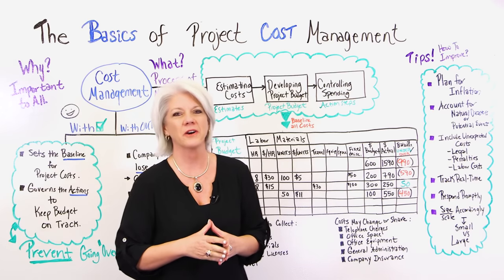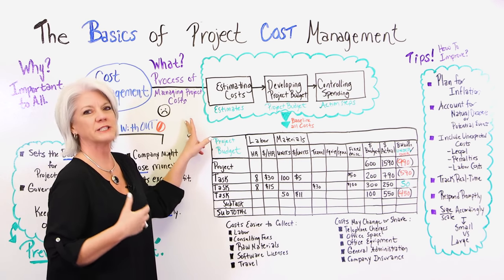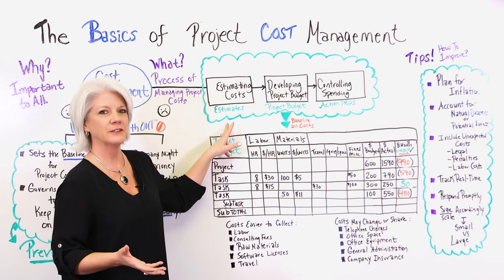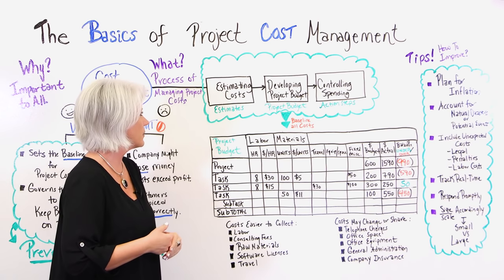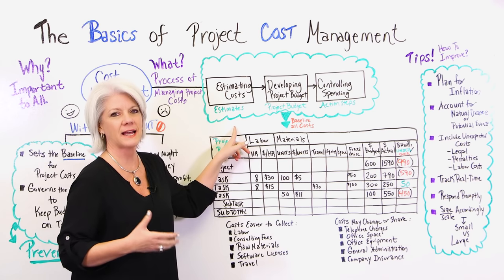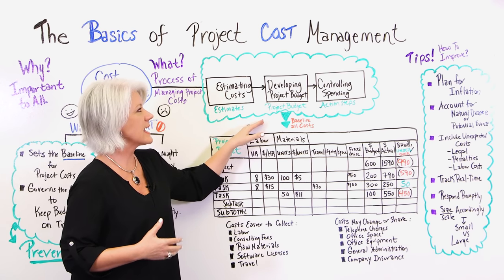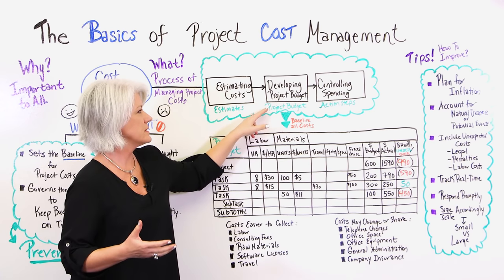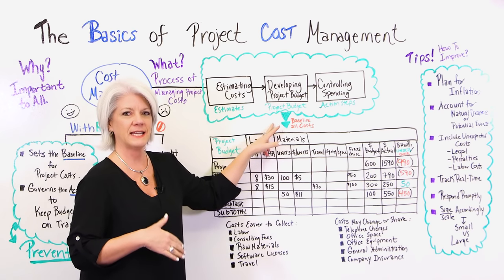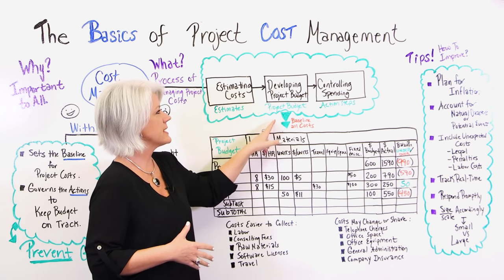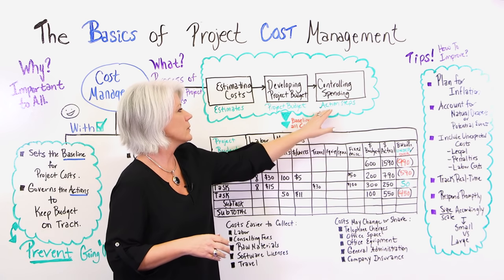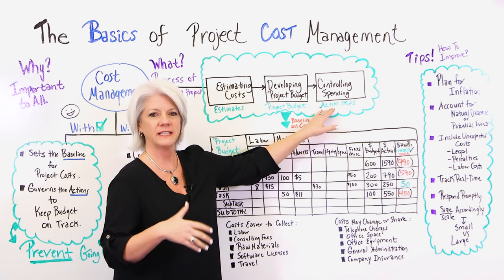So let's look at what cost management really is. Cost management is a process for managing the cost of your project and it includes estimating your cost — all the costs on your project — so that you get a detailed list of all the estimates at a task level. Then you take that and you develop your project budget, which you baseline at the task level. And you take that and it's used to control the spending for your project, so you ultimately have a set of action steps you take to keep on track.